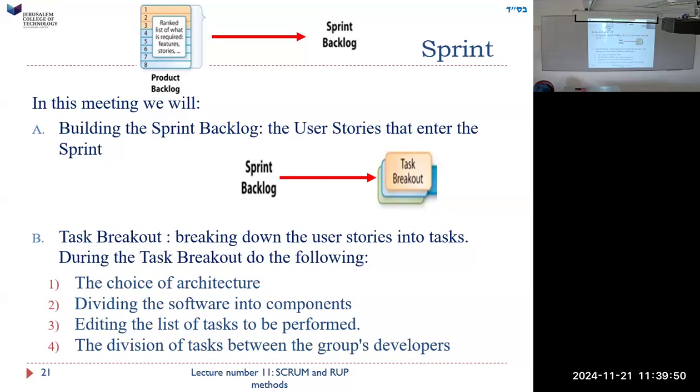We keep a record of it. So I have to add things to the database, and then maybe I have to make a GUI for that. I have to make a window for it. And then I have to run a SQL query to change the data. All those things are tasks that are all designed to get this single story accomplished.